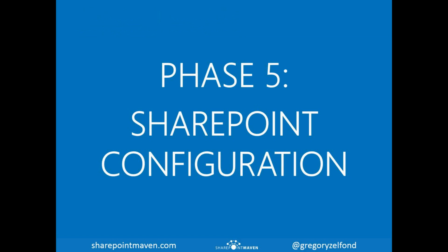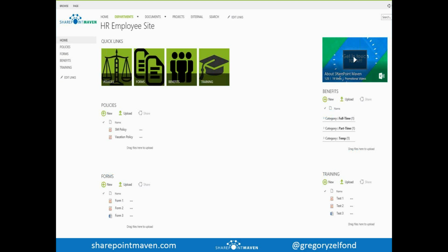Great question. All right, so now we're into a little bit more exciting stuff, phase 5, SharePoint configuration. This is the phase where you will actually get to build and provision the actual sites and document libraries. And as I said previously, even though it says phase 5, it's not like you will be waiting for weeks or months to start building that site. As soon as you gather initial requirements from your users in phase 2, you're pretty much ready to start provisioning and creating the actual sites.